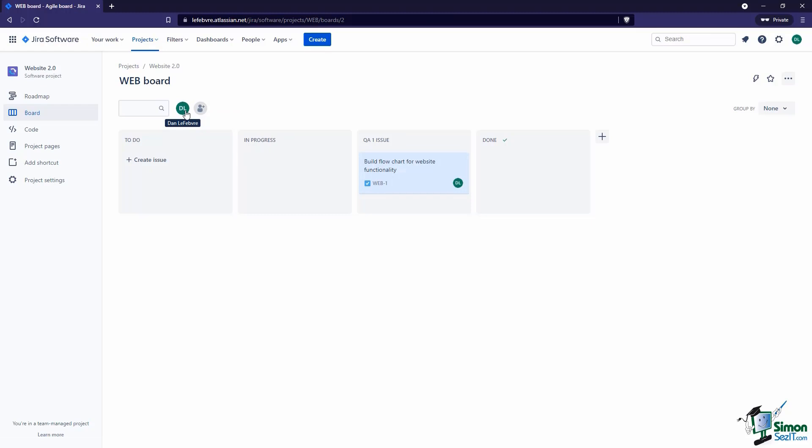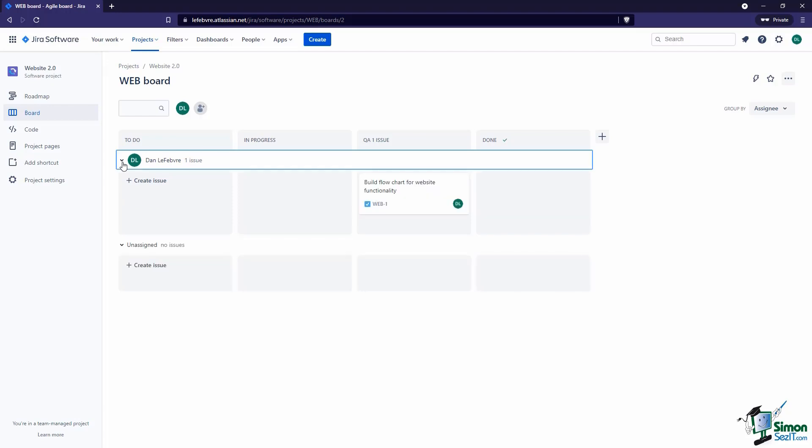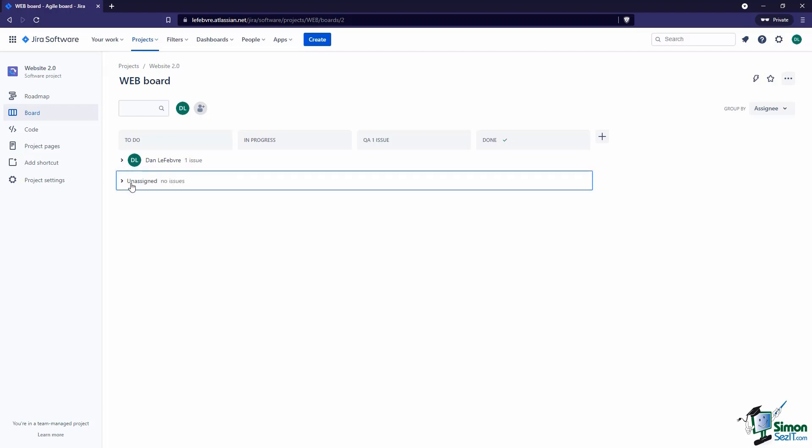We can take that to another level if we want by grouping them. We could group by the assignee or by subtasks. Let's see what this looks like. When we group this, it creates what in agile is called a swim lane. Basically what this does is give another way of viewing and filtering out the issues. If you think we have a lot of different issues on this board, being able to group them is a really nice way of doing that. We can see, okay, these are the issues that are unassigned, which maybe we need to assign to somebody and make sure that gets done so work isn't slipping through the cracks.